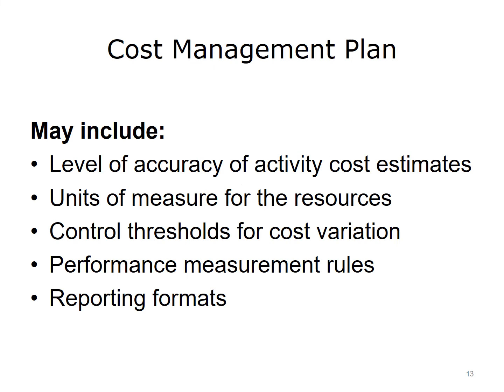A cost management plan sets the format regarding how project cost will be managed. The plan is developed by the project team and is a component of the project management plan. It may include level of accuracy of activity cost estimates, units of measure for the resources, control thresholds for cost variation, performance measurement rules, reporting formats.